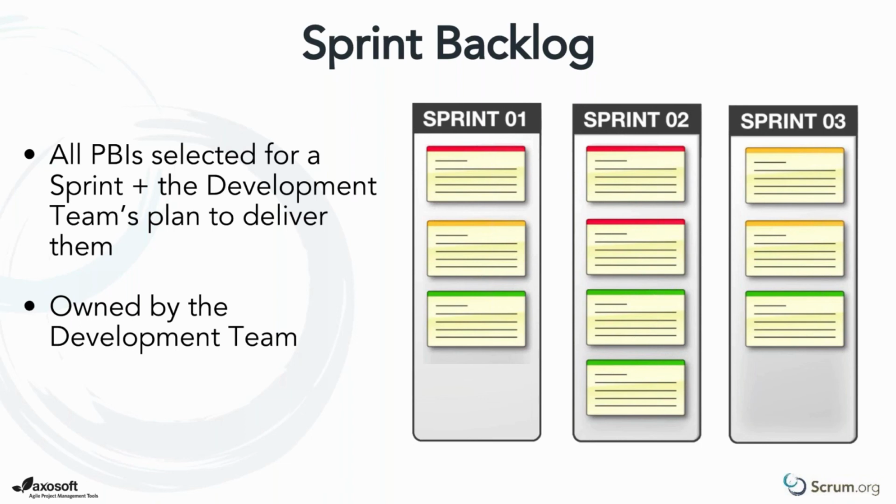I'm only going to have one sprint backlog, so if I'm in sprint, in this example on the slide, I'm on sprint 3. So sprint 1 is complete, sprint 2 is complete, I'm now on sprint number 3. I'm not putting a sprint 4 backlog on until I've completed sprint 3. Not necessarily all the work in sprint 3, but the time box of sprint 3, and we'll talk a little bit more about that. But we're working through that, we're pulling items in, and Jonathan will actually show you a little bit about how that works as well.